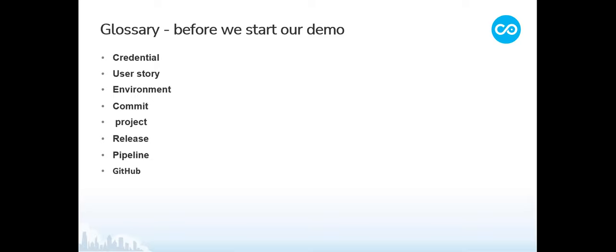A Release lets you group user stories to promote them together and keep track of the version of changes your application experiences after every deployment. A Pipeline is a list of connections defining a path through which components move through the release management process; user stories and projects are linked to a pipeline. GitHub is a host for Git repositories with collaboration features that let you apply and test changes to your code — in Git terms, GitHub serves as a remote, giving developers an accessible source of truth for their shared work.